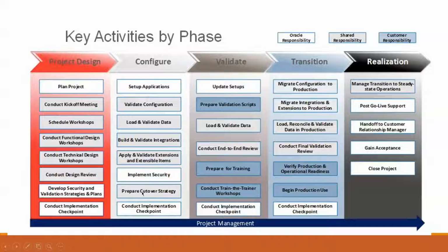Then implement security, as I discussed on the roles, and prepare the cutover strategy. This cutover strategy is important, because let's say the go live date is January 1st. By 30th or 31st December, we need to ensure that all the data from the old system is taken as closing balances, because that needs to be moved as opening balances.